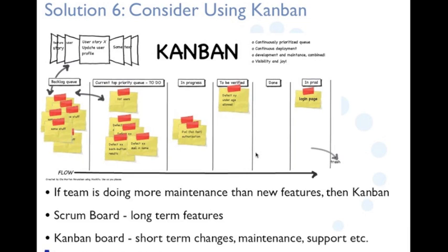The third approach, when we talked about the 80-20 principle, is that for 80% of the capacity that you're planning, you use the Scrum board, and for 20% you have a separate Kanban board. Both boards are maintained by the same team, and that makes sure that whatever you deliver as part of that 80%, you deliver really well, as per the engineering practices and business criteria, because you definitely don't want defects reported later, since you are the one who is going to fix them. So definitely this is the third, which I find quite useful in any of the teams.